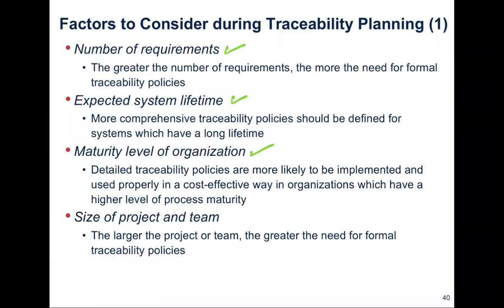Detailed traceability policies are more likely to be implemented and used in a cost-effective way in those organizations which have a higher level of process maturity. Finally, you should also consider the size of the project and team. The larger the project or team, the greater the need for formal traceability policies.